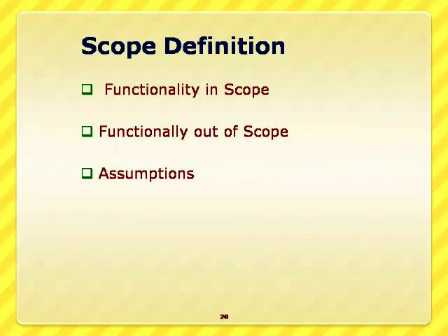so that all the stakeholders are guided by this document and implementation will go smoothly. Suppose I don't define the scope document properly, an influential stakeholder may come in between and ask for an additional requirement. To include that additional requirement, you may have to increase the scope of the statement, thereby you need to redesign the data warehouse. So it's going to delay the project. That's why this scope definition document is essential for the implementation of the data warehousing project.